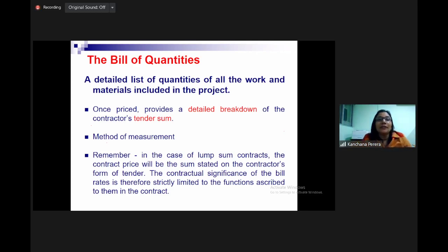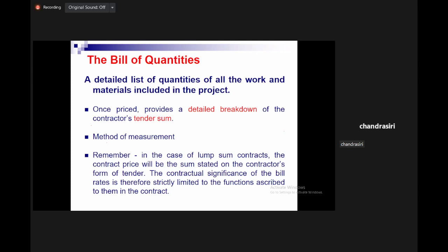At the time of tendering, the BOQ says 10 ACs. But in the drawing at the time of tendering, it says 12. Unfortunately, the BOQ says 10. What will happen at the actual implementation time? Drawing prevails. Yes, refer. What about the payment? Variation. Yeah.